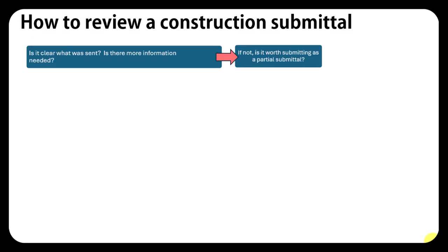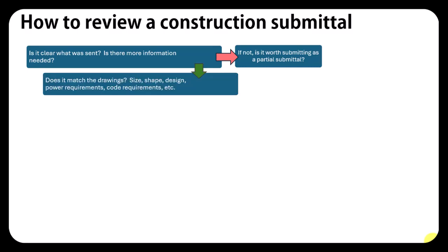But in our situation, our plumber sent us a full submittal packet. It looks great. Now what do we do? Does it match the drawings? Size, shape, design, power, code, things like that. So if we're talking about plumbing, we want to make sure our faucet is the right size.